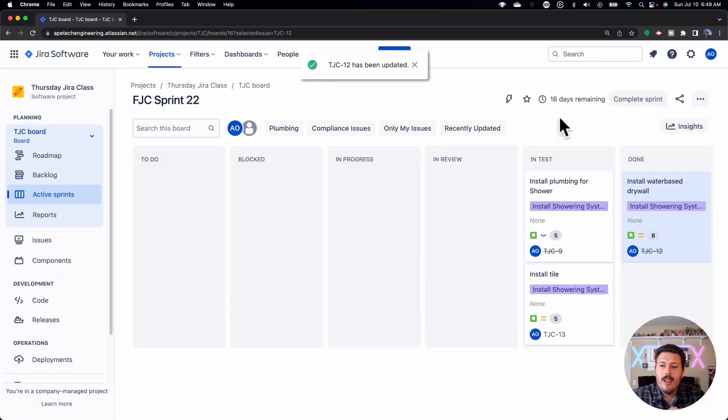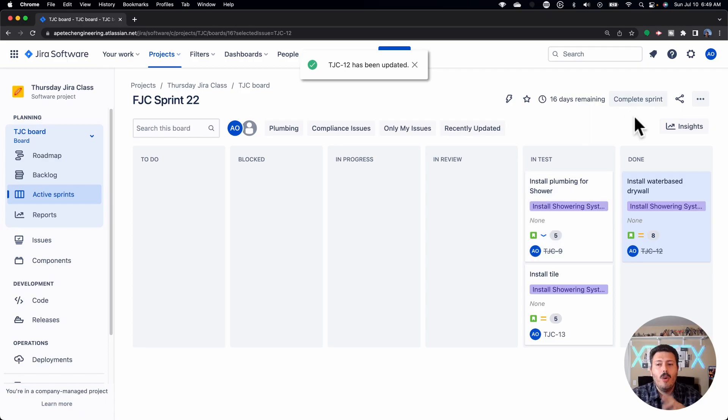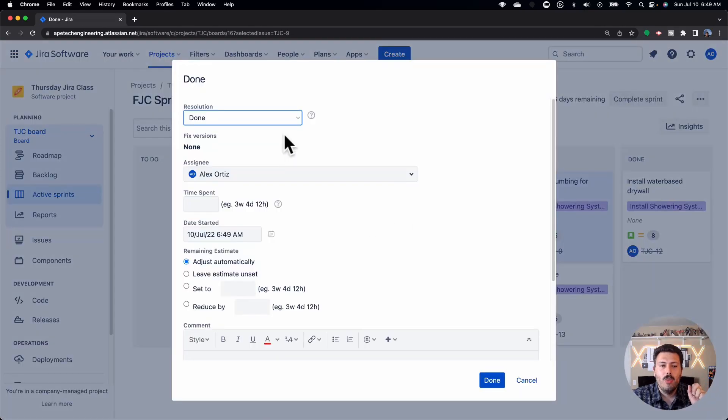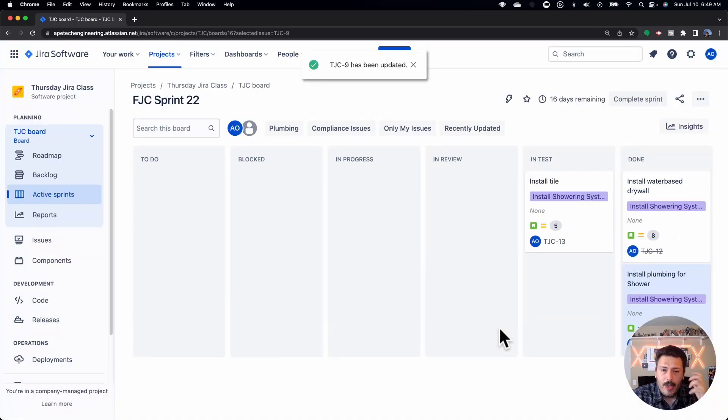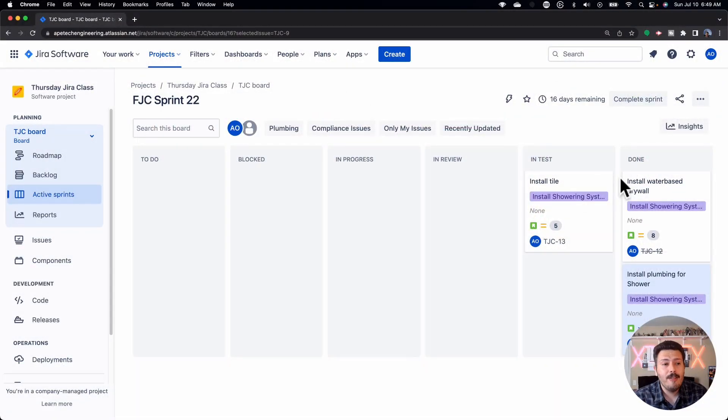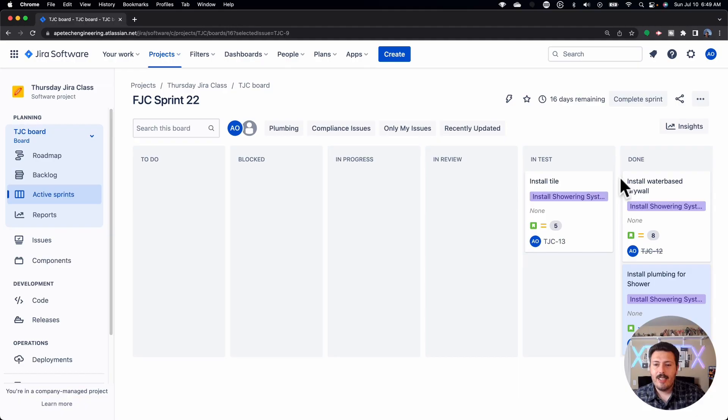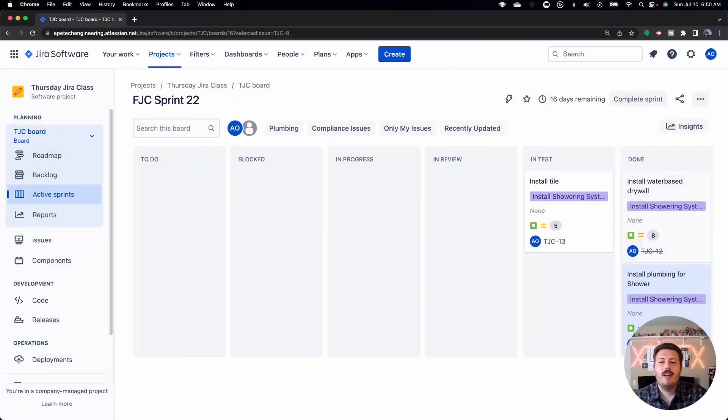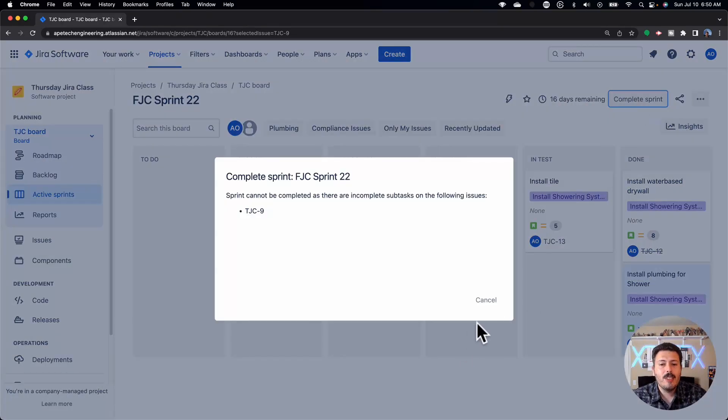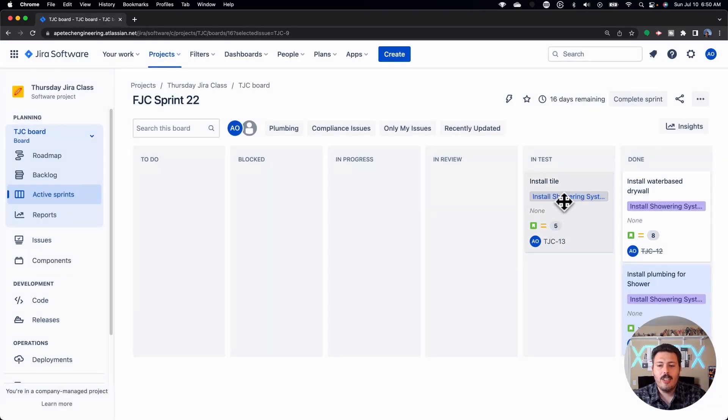You will not get credit for issues until they all move to done. So if you go and complete your sprint and you didn't finish this out, you are not going to get credit for your issue. So you want to make sure that you're following whatever process you have established within you and your team to get all these issues to the actual far most right column. Because in Jira, if it's not in that far most right column, it will roll to the next sprint. You don't get credit until it's in that farthest most right column. Once you're satisfied, once you've had your review, everybody kind of crossed those T's and dotted those I's, obviously you're going to have a little bit of work left. But my recommendation is don't anticipate that you're going to finish 100% of a sprint. I typically have my team shoot for like 80%. And so at this point, once you're kind of satisfied, everybody's taking the credit they're going to take, you can then complete the sprint.